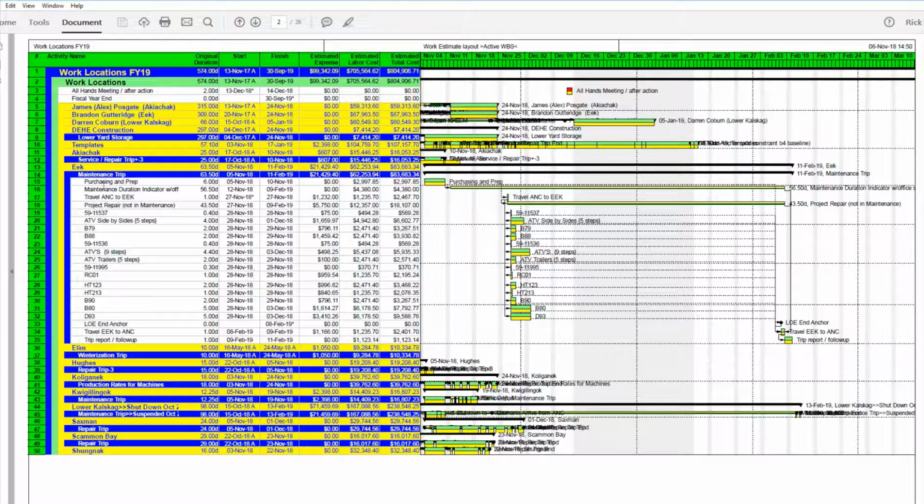And the baseline for this schedule is simply called EEC PM trip. I believe I called it November too. But the point is, you need to set a baseline right here. That is your primary baseline, or your base, or your initial, whatever you want to call it, your beginning baseline to track this. Because if I went to, for instance, Elam or Hughes and was looking at a schedule in there or a block of work in there, and I set my current active baseline to project for Hughes instead of EEC, it's not going to accurately represent what we had planned. The baseline will not match.